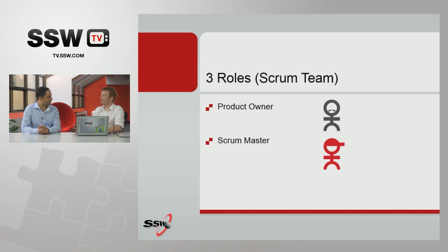Yes. Because you'll always be someone in the team that will fancy this sort of role, thinking, I quite fancy the title Scrum Master. And from my experience, I would recommend that the Scrum Master be outside of the development team. Because when you're that close to the project, it's very difficult to create that sort of separation that the Scrum Master needs. The Scrum Master needs that overall eagle view, and to swoop down and focus on certain issues at a time. Whereas when you're in the trenches, it can be very difficult to do that.